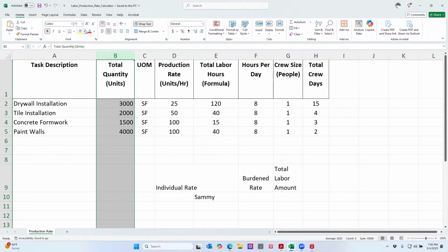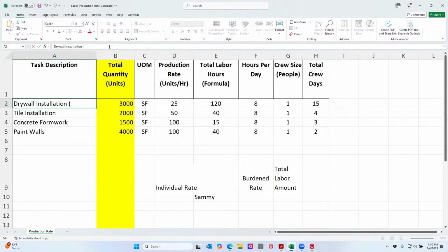identify your total. Whatever the item is, factor what is the total based on that unit of measure. All right. So here these items are based on square foot. All right. So let's say, for instance, a sheet of drywall, and I'm going to just put a note here. Let's just take a sheet of drywall, let's just say a house. It's going to be a 4x8 sheet, a 4 foot by 8 foot sheet. So that's 32 square feet.